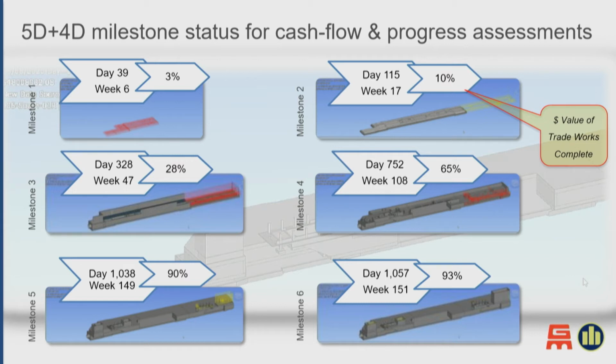A kind of cool story that came out of this, and this is what we discovered while we were in our discovery phase, is that by joining this cost and time aspect, we started to have conversations with Gamuda about a fairly big problem they knew they were going to hit, and that is that this project would actually demand more concrete than what Malaysia could supply at some point in time. What they didn't know was when. So that was like a looming danger for them, and they had just resigned themselves to the fact that at some point it'll happen.